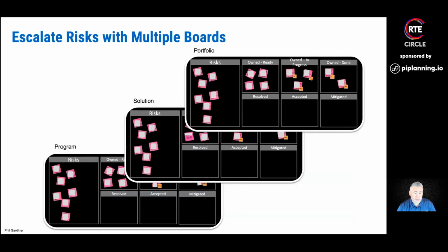Then the other piece, if you're beyond the Essential SAFe configuration, maybe you're part of a solution train, maybe there are multiple agile release trains underneath the portfolio. What you'll find oftentimes is that the systemic issues that impact one ART might impact your entire value stream. They might impact multiple value streams in your portfolio. And so a lot of times with customers at high scale, we end up putting these risk boards in place at each level of SAFe, so that we have a path to escalate.